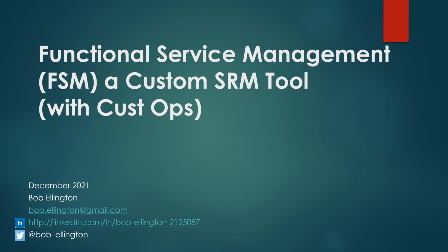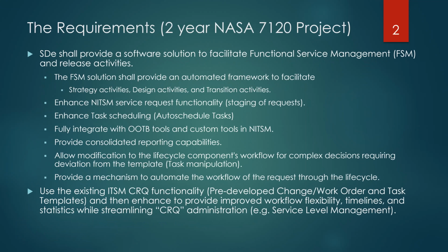We then put in a big NASA project where they provided funding for us to go through a full process. So we went into a 2-year NASA 7120 project. The 7120 project defines your entire process from inception all the way to deployment, and all of the government gates that you've got to go through to get your ATPs to keep moving forward.